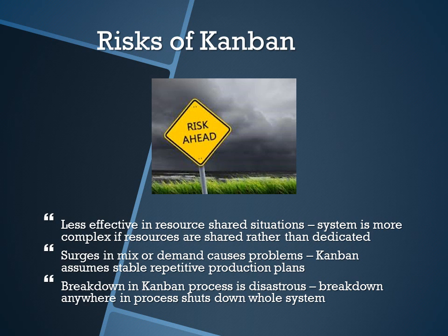Kanban is not, however, without its risks. It is definitely less effective in resource shared situations. The system becomes a little bit more complex that way. So say, for example, you have two developers and they're working on a feature for you. Well, if they are working on a feature for somebody else at the same time, your timelines and estimates get a little hard to manage there, because what they estimated over here could take longer, which then makes yours take longer, or they may finish yours first, and it just, like I said, it becomes more complicated.